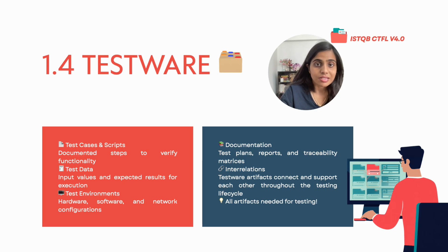Now the third part is test design. Test design outcome will be identification of environment, identification of test cases. The test cases will be ready as a part of test design. Then you have test implementation. As the outcome of test implementation, you will have the test suites or test procedures, a schedule of how to execute the test, environment will be ready, the software will be ready, everything will be ready as a part of test implementation. Then you have test execution. As the outcome of test execution, you will have the reports, defect reports, etc.